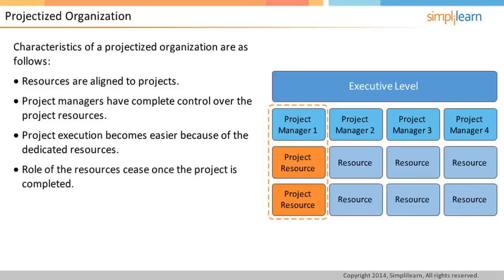Secondly, highly specialized roles within a project may not be fully occupied all the time. For example, a purchase executive may have work for selected periods on a project while purchase activities are going on. However, for the rest of the period, their capability may not be optimally utilized. There is less scope for functional specialization as the project boundaries limit the kind of work for the resources.